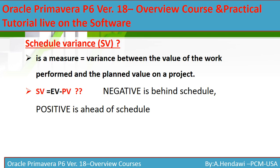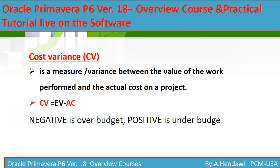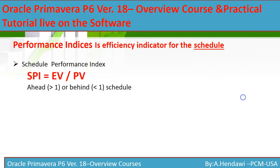Cost Variance (CV) is a measure between the value of work performed and the actual cost. CV equals Earned Value minus Actual Cost. If negative, you are over budget — meaning your actual expenses are more than what you planned. If positive, you are under budget.